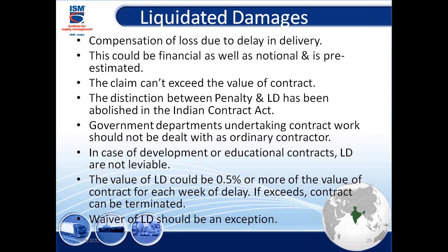The government department undertaking contract should not be dealt with as an ordinary contract. In case of a development educational contract, liquidated damages are not applicable. If you're giving an educational contract to someone to develop your study material, in those situations you can't.